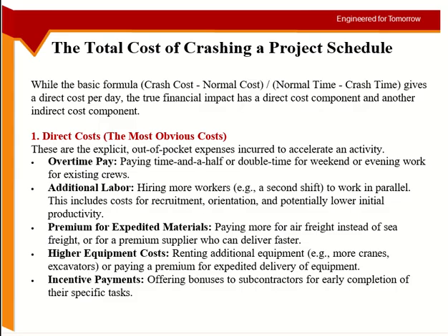Now in each of these items there is a direct component and an indirect component. For example, when you are paying overtime to the labor, when you're asking them to work for extra hours, for these extra hours you have to arrange things on the site as well for them, right? You need maybe extra supply of water.